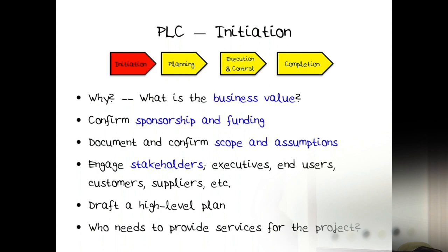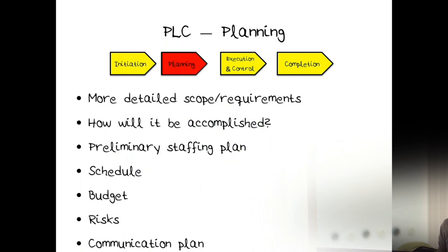You confirm the scope, some assumptions. You engage stakeholders, which means executives, users, customers, suppliers, whoever is interested in this. You draft some high-level plan, and you figure out, do we need any services for this from the outside? If you're thinking of one team that should be doing it, do they need services from the outside? Because you might not have all the skills on the team.